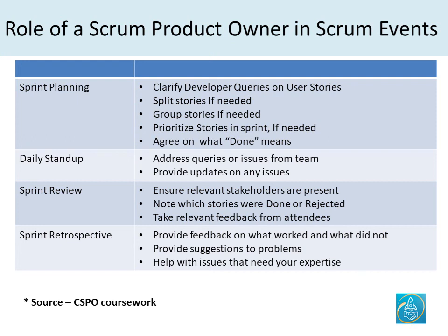During the sprint review, as a product owner, you need to make sure that the relevant stakeholders are present. It could be the development team members or the stakeholders from the business user side. And then you need to take a note of what was done during a sprint and what was not done. And then finally, take the relevant feedback as necessary to focus on the next sprint.